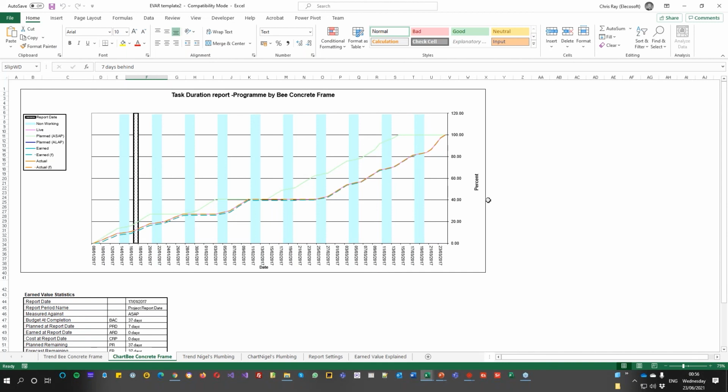So one of the questions someone's asked here is about updating using activity count. Activity count is where you assign equivalently a dollar per day to every task, and then you can analyze that against the baseline. This replaces the need to do activity count. It actually does the activity count. It does that in the background based on duration. So that side of it.